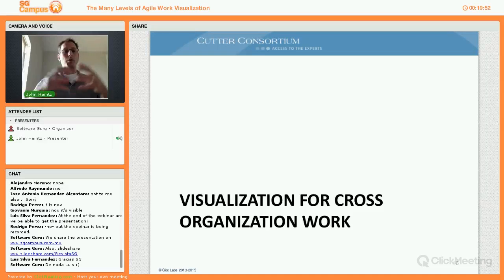After approaching the very big picture of 1 to 4 years in a road mapping that is aligning across the market and features and architectural evolution, then within the slice of what are we doing next, we can look at a slightly lower level of detail. This would be at the level of agile release planning. This would be quarterly planning cycles, or a few months of planning towards a release or a customer go-to-market.